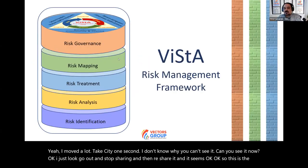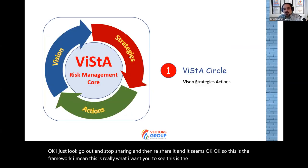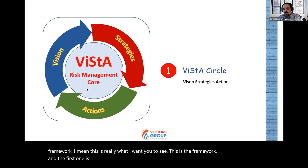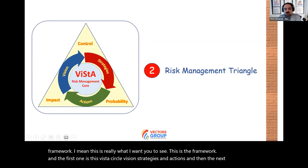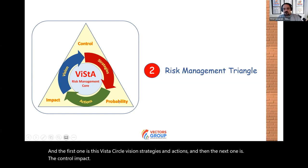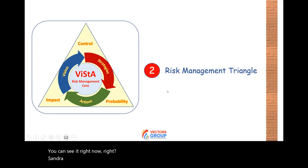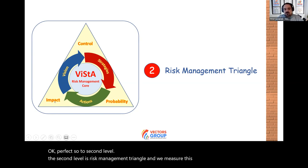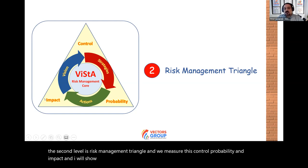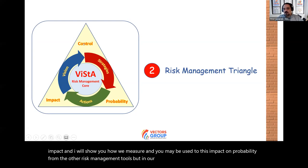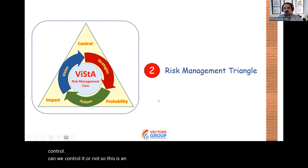The second level is the risk management triangle. We measure three parameters: control, probability, and impact. You may be familiar with impact and probability from other risk management tools, but in our model we add another parameter — the level of control. Can we control the risk or not? This is an important additional parameter in risk management.